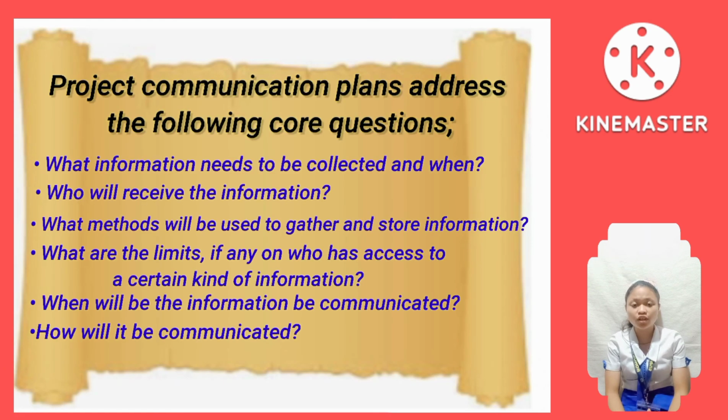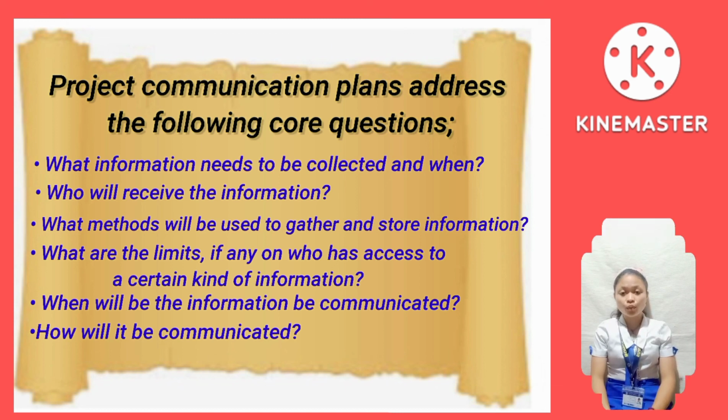Project communication plans address the following core questions. First, what information needs to be collected and when? Second, who will receive the information? Third, what methods will be used to gather and store information? Fourth, what are the limits, if any, on who has access to a certain kind of information? Fifth, when will the information be communicated? Sixth, how will it be communicated? Developing a communication plan that answers these questions usually entails the following basic steps.